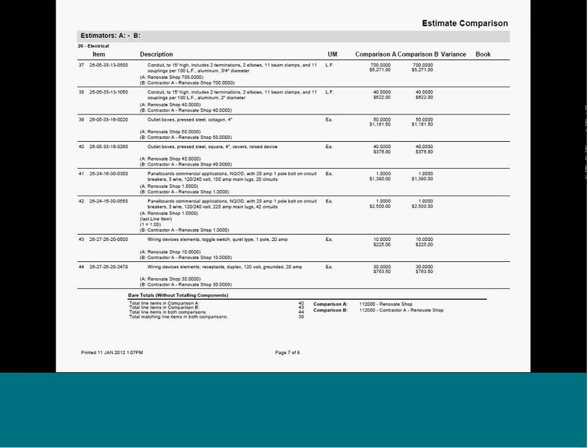But what we want to do is let people build estimates, but then we want people to get together, negotiate those estimates, and award delivery orders, because we can estimate all we want. The only way it's a successful SABRE program or JOC program is when we actually start the work, and that can't happen until you agree to a number. So the estimate comparison is meant to allow you to rapidly review an estimate by your contractor, side by side comparisons, and of course the next step would be what's called the technical evaluation.